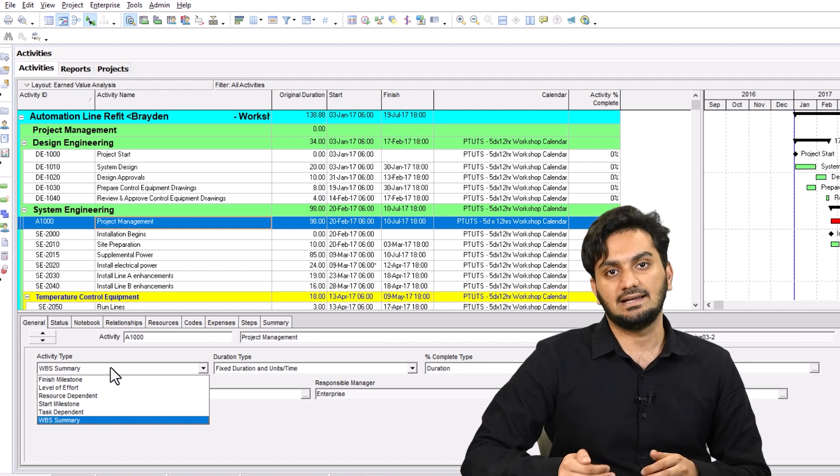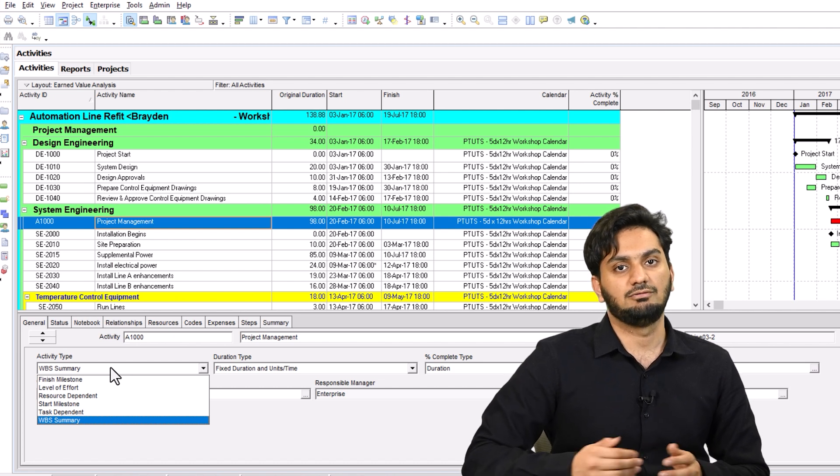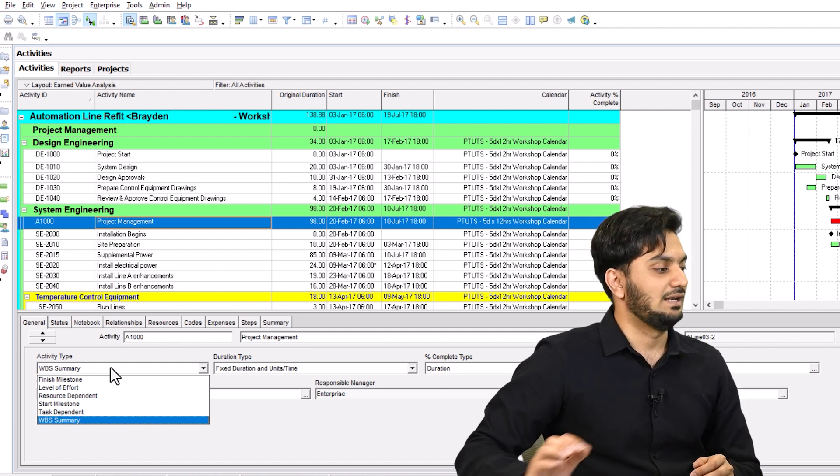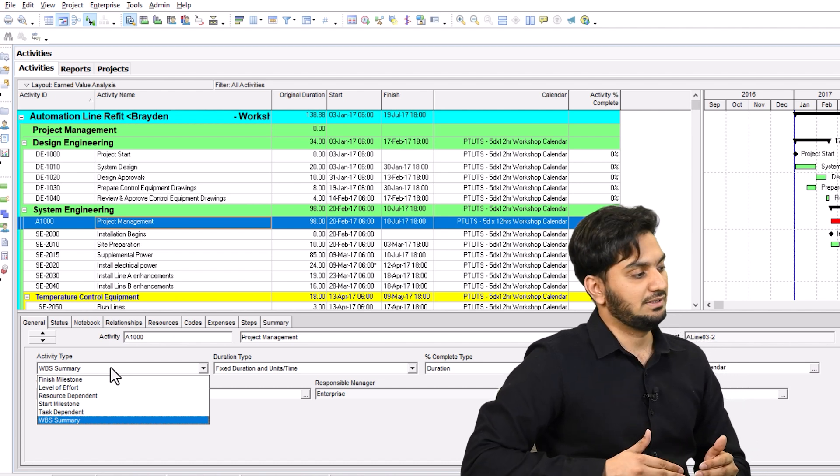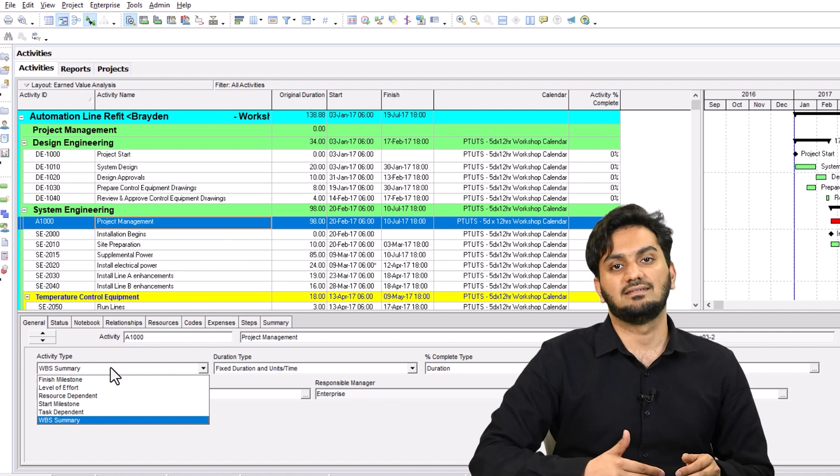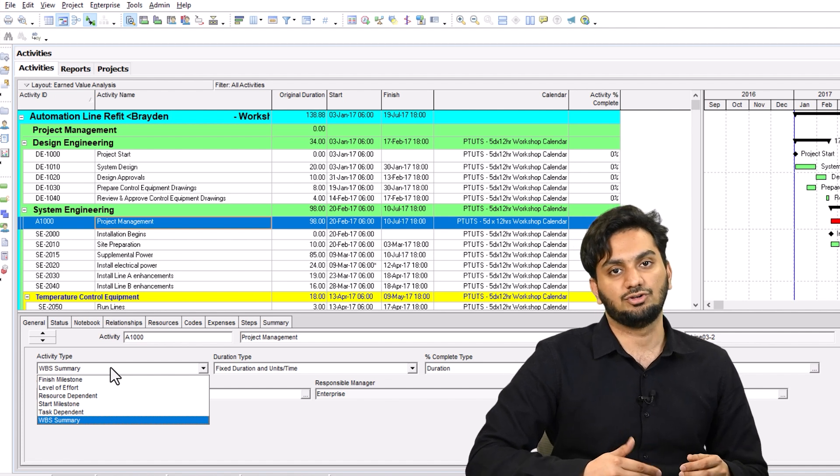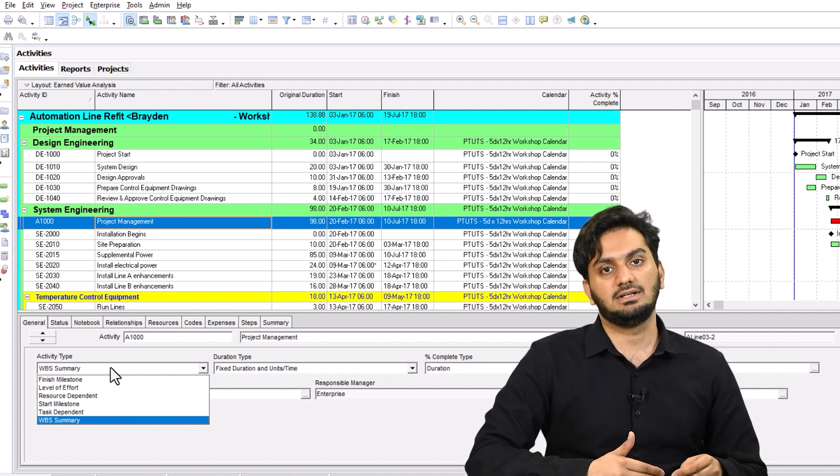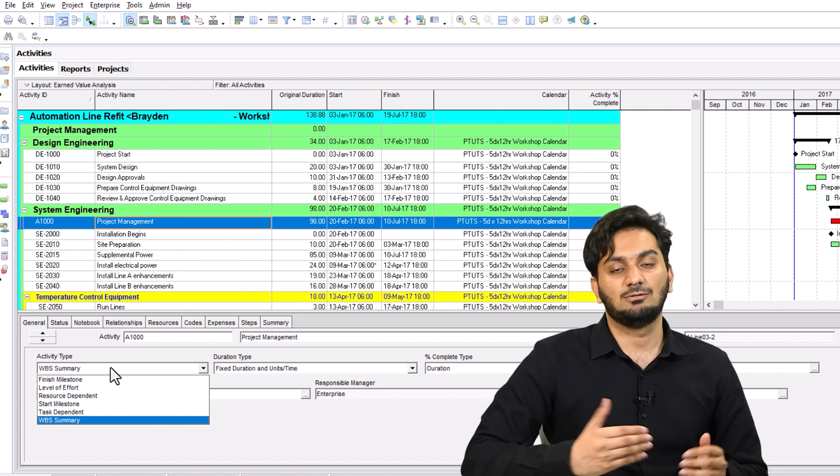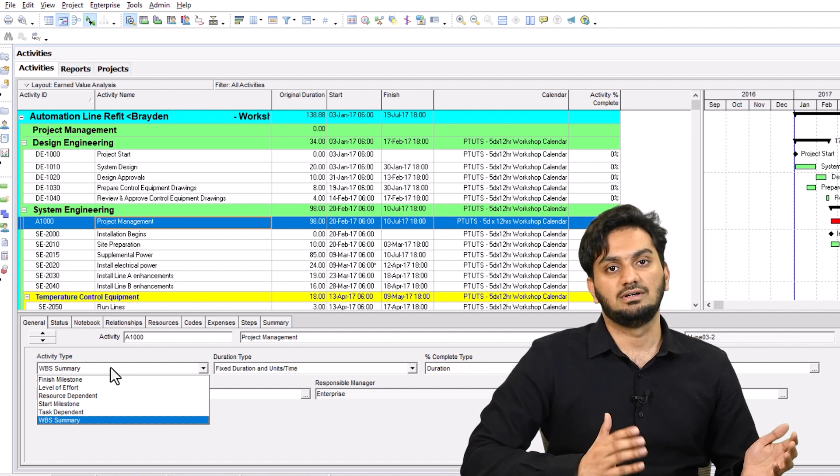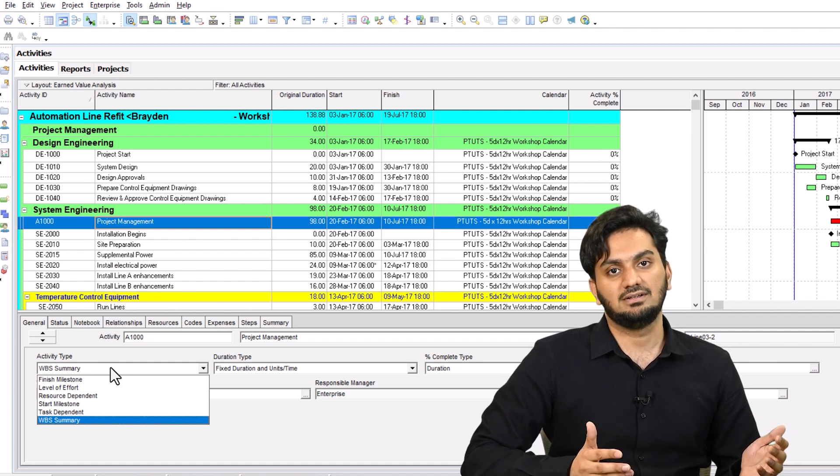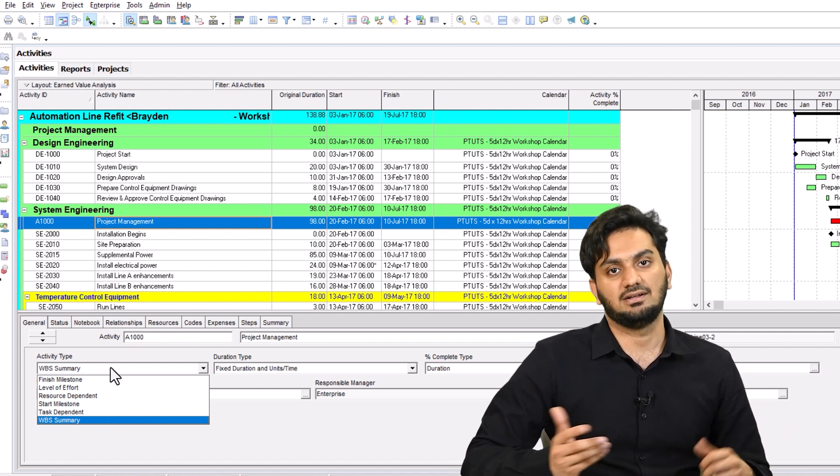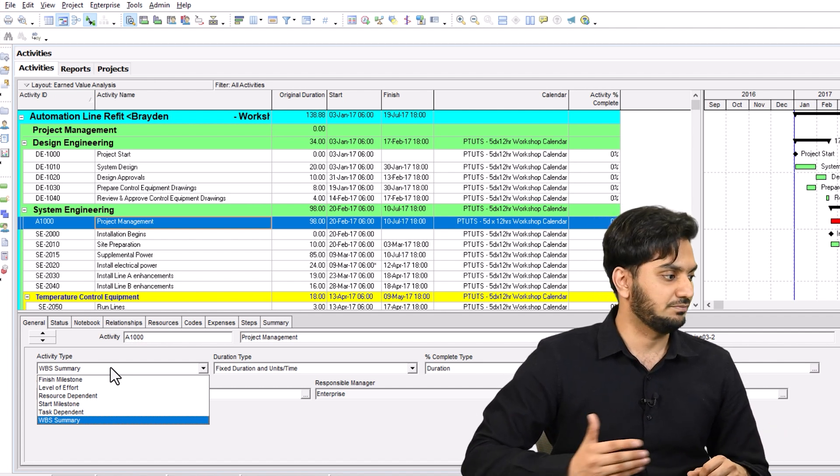If you're changing the activity type, it will not behave the similar way. Like we have activity type finish milestone, that has a duration of zero always. We have level of effort activity, which calculates the duration between two different activities, if you link them from start to start and finish to finish.